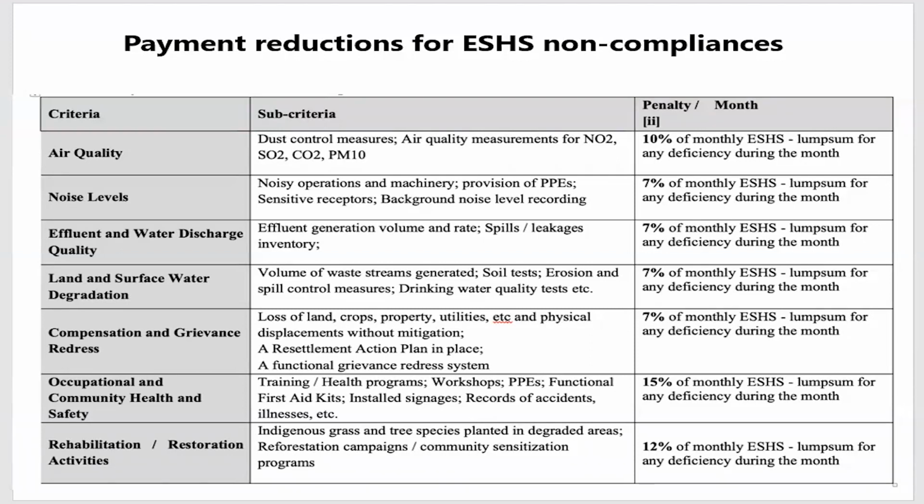These are clearly defined under the projects that we are undertaking. And the compliance is that any time every month the contractor defaults in meeting the standard set, he is deducted, or there's a penalty that he pays for missing this target.